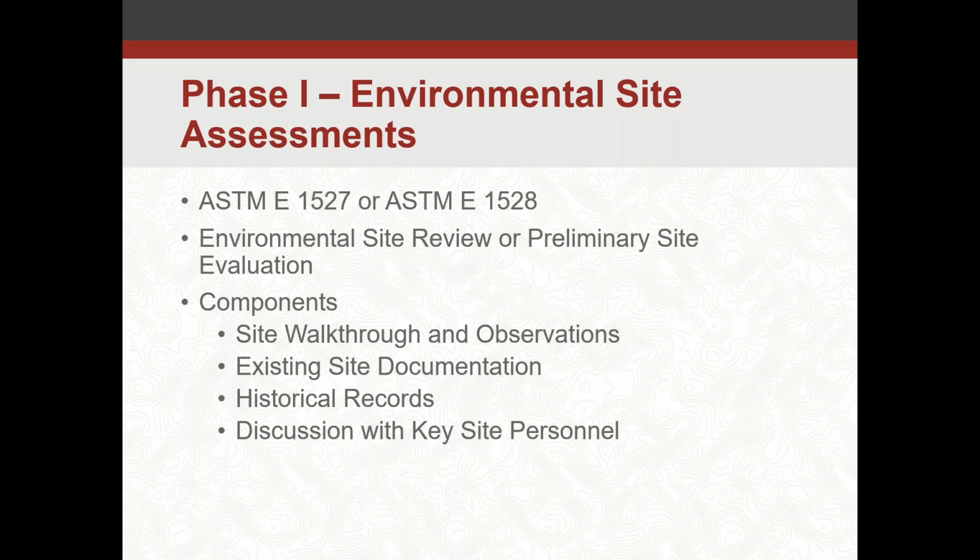So you could follow something to that program, or, if you're not looking for anything as extensive as that, you're just trying to get a preliminary evaluation of a site, you could do just a cursory environmental site review, where you target a certain area of concern, or certain contaminants of concern, and review different historical data and information, to see if there's anything available that might help you as you progress through the design and survey phase of the project.